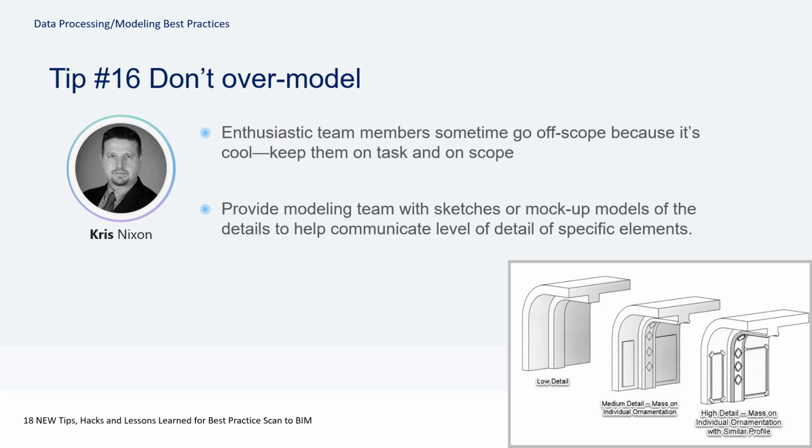We've seen it too, where we would put in what we needed to, which was all of the top rails, and then in another part of the model, they had gone through and modeled all of the individual monorails as well, and so then that became an issue. Yeah. Why is it in this part of the model, not the other? So you just got to really watch for nailing the model scope, both over and under.